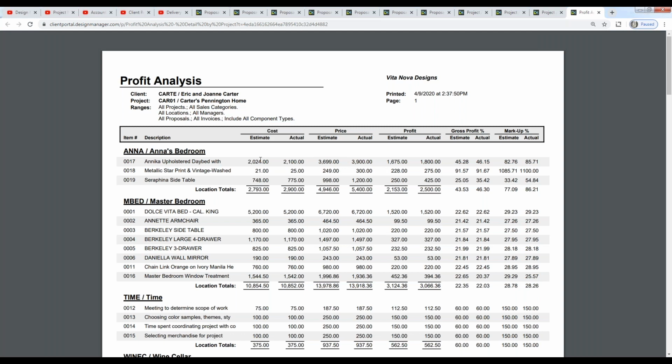Why would you do that? You've received the vendor invoice, all right? Yes, it may be higher, it might be lower. By not changing the cost back on the component is when I can then evaluate why my cost isn't what I anticipated it to be. Further, it's redundant work.